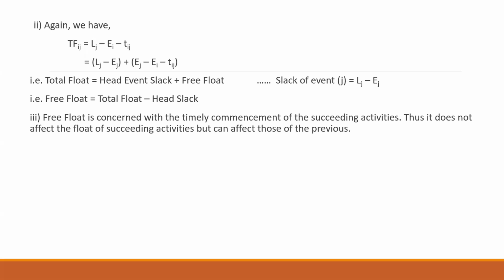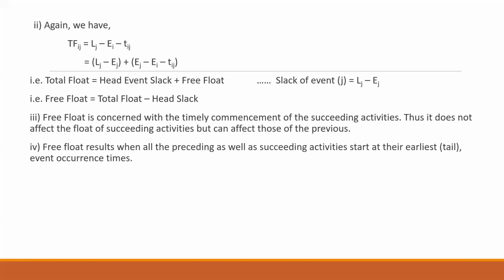Now, your free float is concerned with the timely commencement of your succeeding activities. Thus, it does not affect the float of succeeding activities, but can affect those of the previous ones. Your free float results when all the preceding as well as the succeeding activities start at their earliest event occurrence time.